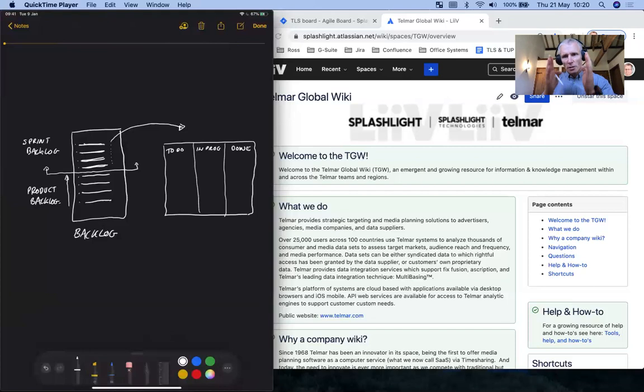Now again, this workflow can be adjusted, and many teams actually will have more stages than this. The trick is to pitch it about right. It's enticing to start to get very, very granular at this stage. So we'll have to do, we'll have ready, we'll have on hold, we'll have in progress, we'll have in review, we'll have testing, we'll have ready to deploy, we'll have done. Perfect in theory. And many teams will start with a simple board like this, to do, in progress, and done. And then they'll rapidly inflate this to a very, very granular board. And then they'll find they're doing just too much admin. So then they tend to suck back into something a bit smaller and optimized. But for simplicity's sake, let's stick with to do, in progress, and done.